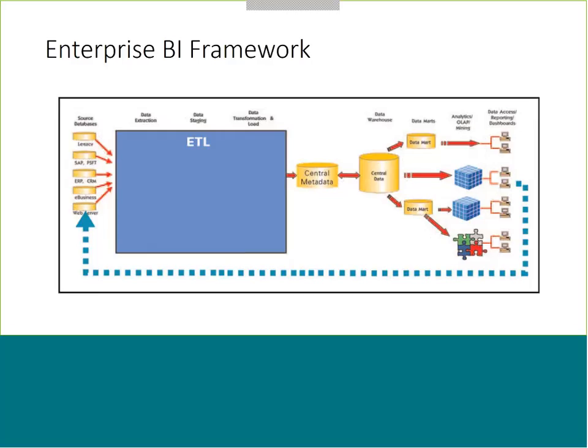And if you look at this, this is actually very similar to application migration. When someone comes up with a bright idea of throwing away an old system and creating a new one and moving all the data from the old one into the new one, 50% of those projects fail. And that hasn't changed over the last 30 years.